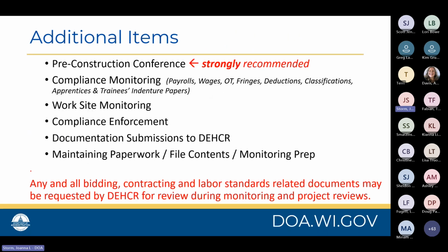Additional items to keep in mind. It's really useful to have that pre-construction conference. Again, it's not required, but is strongly recommended. Compliance monitoring will be a large portion of your work as a grant administrator. So make sure that you're reviewing those payrolls, wages, overtime, fringes, deductions, classifications, along with the apprentices and trainees' indenture papers. It'll also involve worksite monitoring, compliance enforcement, documentation submissions to your assigned program representatives here at DECRA, and also just generally maintaining all of the paperwork, the file contents, and preparing for monitoring.